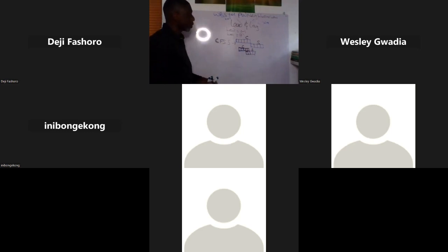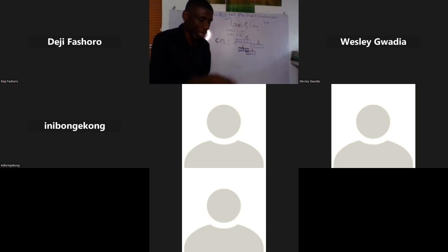What's the relationship between column and substructure now? Substructure is the successor activity to column, but it now has a 2 days lead time. So I'll just put CFS minus 2, right? Minus 2 means I want substructure advanced by 2 days.